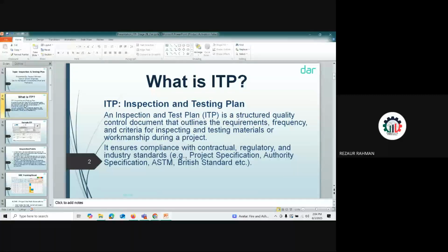So which testing? Because testing is a requirement. Some are under specification, some are under other requirements. So accumulating all, we have to put it in the inspection and testing plan. In this case, it will be very clear for the stormwater or sewage which testing should be done, how it will be accepted, and how we will know it is passed or failed. So this is generally what is mentioned in theory. I already explained to you.